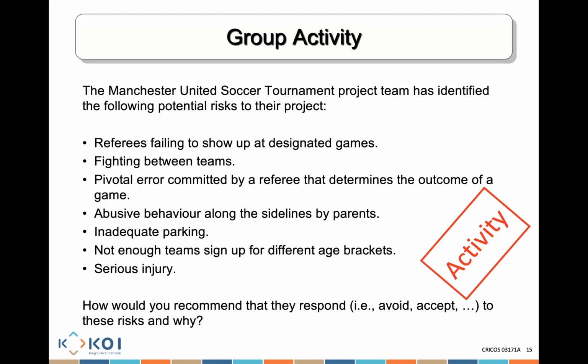Transferring risk? Transfer? Yes. Okay, how did you transfer it? If the referee is hired from a football club or an organization, then they could take care of this matter, whether the referee commits any error. Fair enough, that would work.